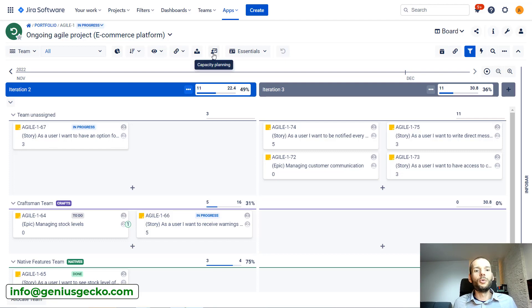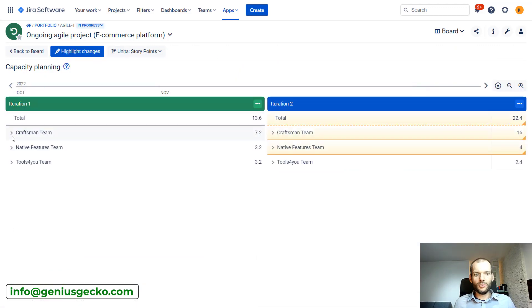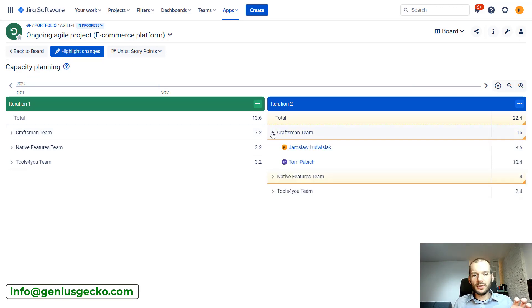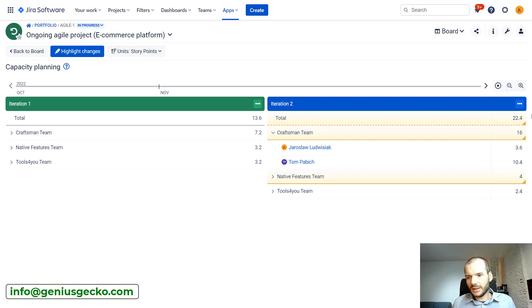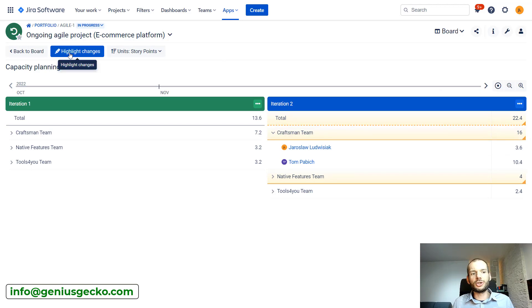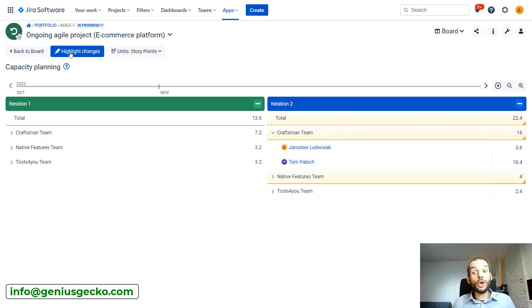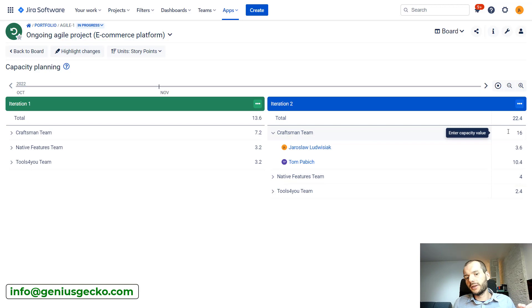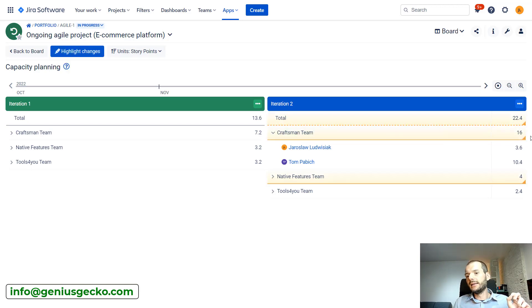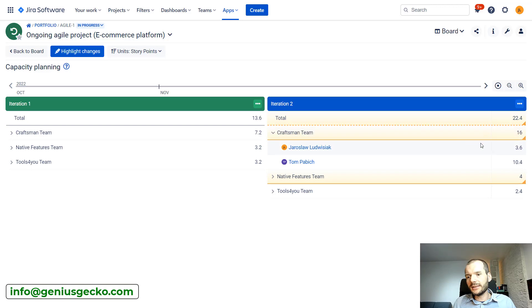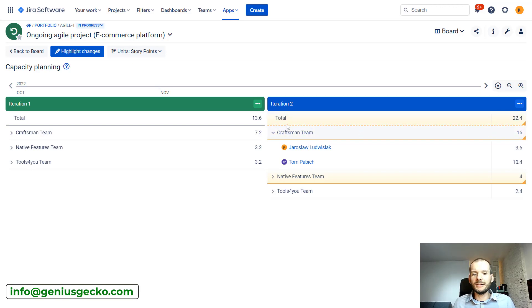Changing values from over here is one thing, but we could click over here. There is a capacity planning option here. And we have iterations here. We have swim lanes for teams. We can drill down into these teams and see values from the user, basically what capacity each user is providing for the team. And you can see that I have some highlighted elements over here. This is because this feature is enabled: highlight changes. It shows me what was manually changed. Because I changed manually just a moment ago capacity of the team, it is now highlighted. The things that I changed are highlighted or underscored with this hard line. The things that were impacted by this change, so the total capacity, is shown as this dashed line.